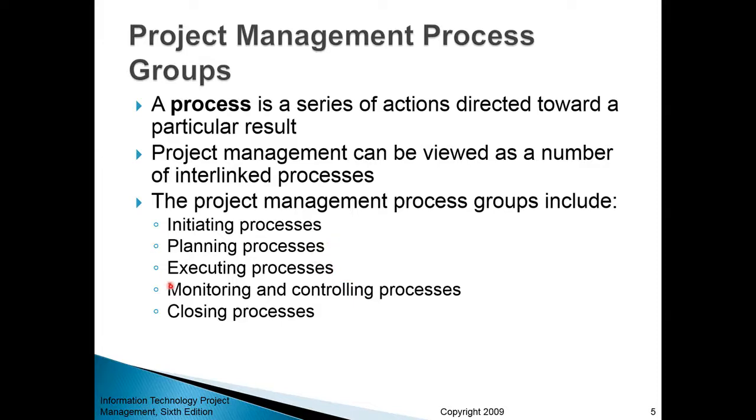Then you have the so-called monitoring and controlling processes. This phase overlaps all other process groups, because monitoring and controlling ideally should be exercised throughout all phases of a project. But it is especially important during the execution phase, because this is typically the longest stage, and this is where most of the resources are consumed.